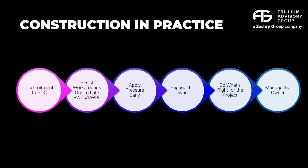And I'll just share an example from the project, Tanis, if that's okay. We started seeing about a year and a half ago, prior to some of these CWPs that were about to start piping, that some valves were going to be late. They're already projecting them to be late. And the owner immediately asked construction, what's construction going to do about it? And I remember sitting in that meeting, and my reply was nothing. E&P has the responsibility right now to finish the procurement effort and begin the expediting efforts. And I didn't say that to be facetious or to not work with them.